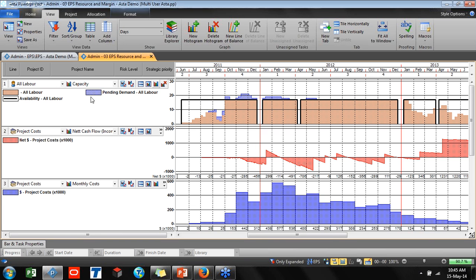And as a resource manager, when the project goes to the resource manager, they can allocate resources, and this part shows that the resource manager didn't assign resources yet. The reason is that your capacity is limited, but the project manager here requires more.